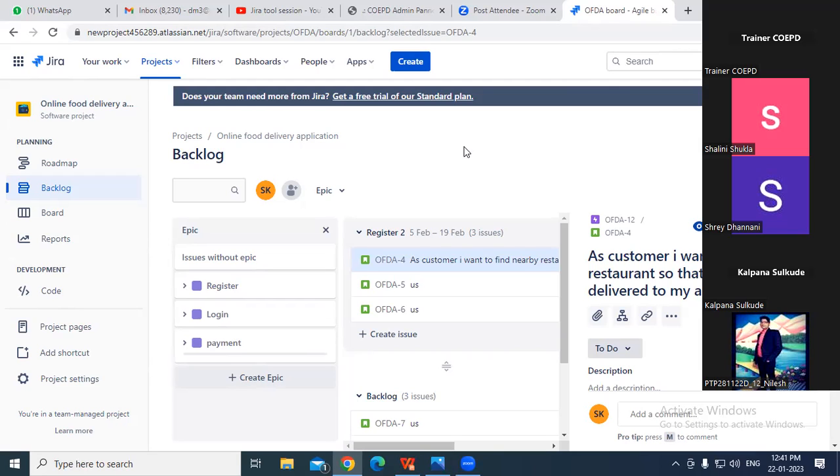If your planning is not completed at all, Shalini, and no discussion has happened, if you have put everything in and the sprint has started, the changes are not accepted in a sprint. You can run multiple sprints in parallel, but you can't make changes to the current sprint.